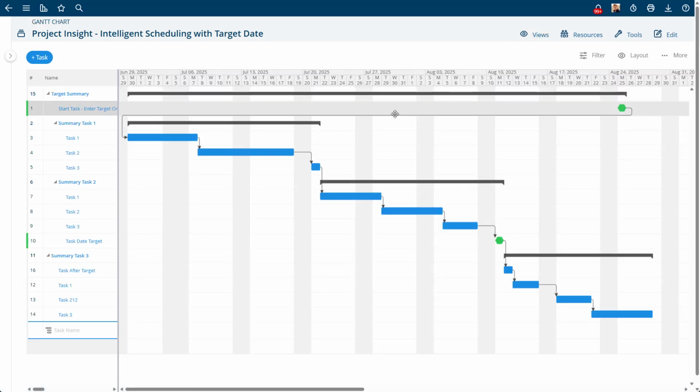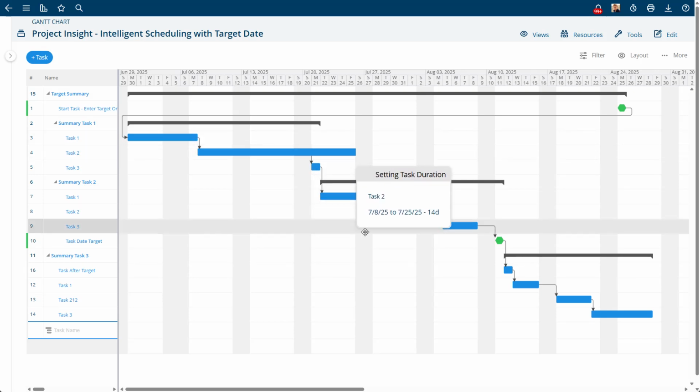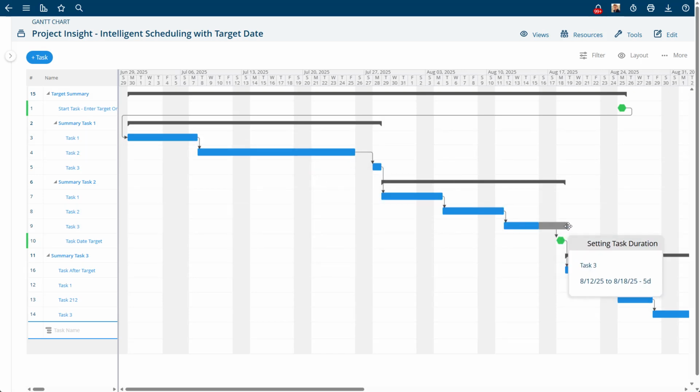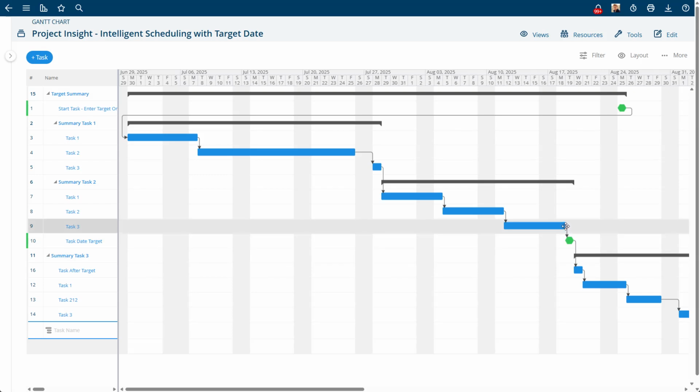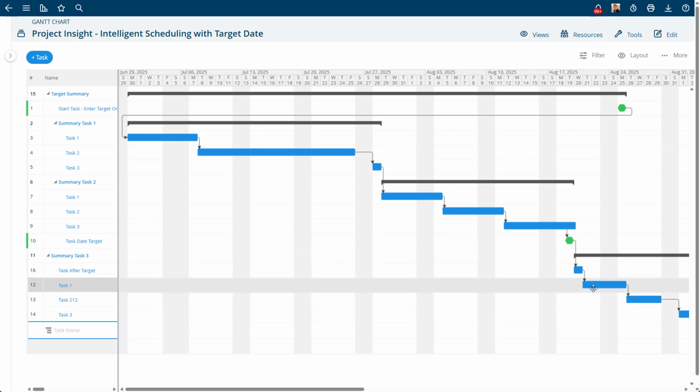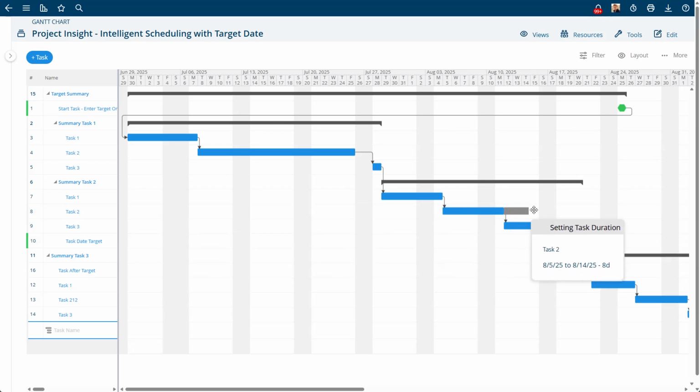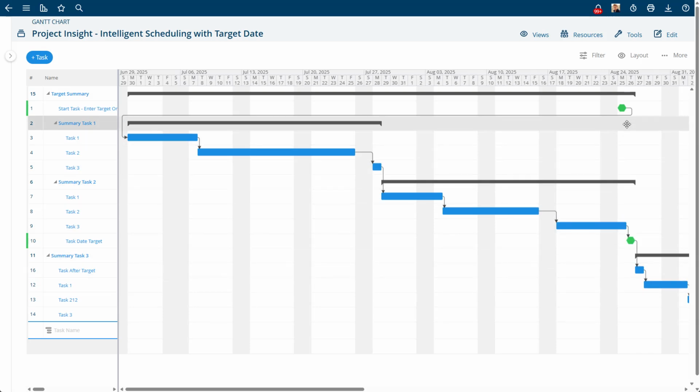And the reason I put it at the top there, it actually landed earlier than the target date. But this really needs to be equal to this amount of time. So if that took 40 days, then I would have assumed that this is a couple more days and this is a couple more days, and you might even have a slack task in there to get it to be landing at the same time.